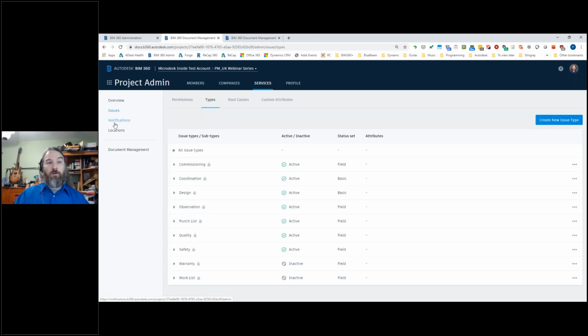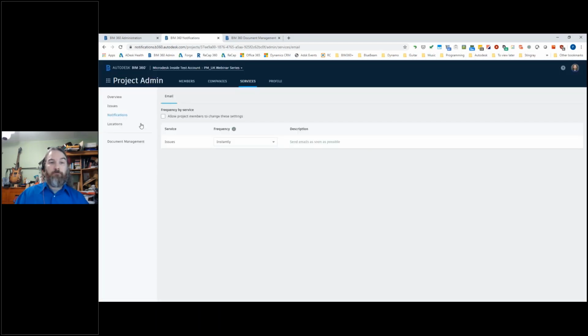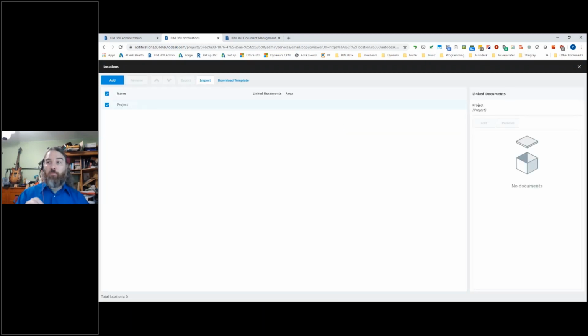I can also come through here, track my notifications, see how often I want to be notified about things. And I can also set up my project locations. Project locations is something where when I'm working with issues and I want to say this is where this is happening. Now I can put the push pin on the drawings or even on the models and say this is where it is. But if I want to have like a field that says first floor, second floor, east wing, however I want to break it up, this gives me that component.